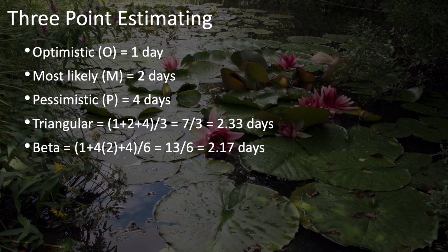In my case, whenever I'm managing a software development project, I find that those types of projects are much riskier and that the pessimistic estimate needs more of an emphasis. So it's not uncommon for me to take these 3 estimates and then average together the most likely and pessimistic and throw away the optimistic altogether. Because really, in software development, how often does everything work so well that you hit your optimistic estimates? It almost never happens. Usually you're somewhere between your initial guess and your pessimistic guess.